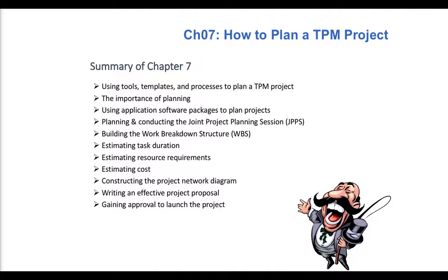Then you need to write a project proposal. This is going to be a more detailed fleshing out of the project overview statement, and it's that project proposal that's going to give you permission to proceed to launching the project.